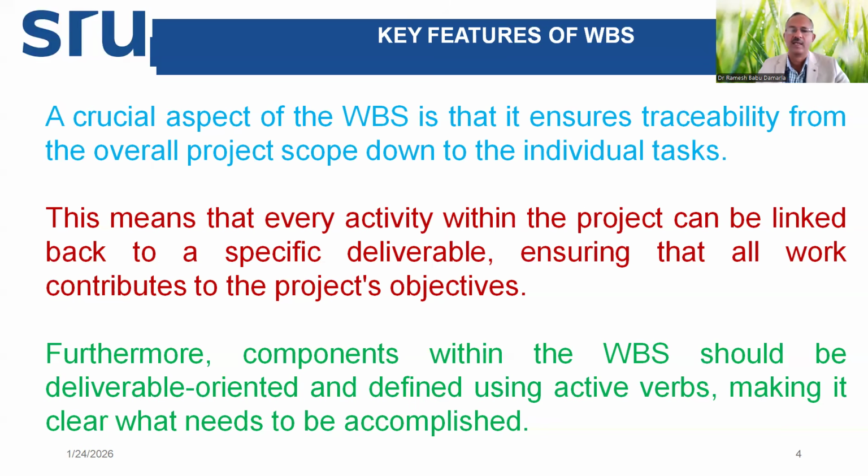Okay? Or connecting with the connectors. Or battery testing or performance measurement. So like this, we should use a verb to define what to be done with that particular element, making it clear what needs to be accomplished. This is very important.